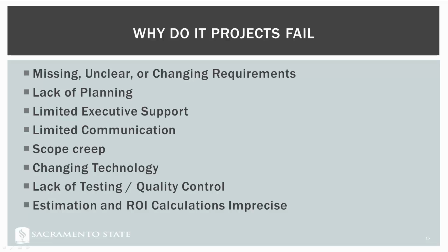Why don't we just add a few things to that system and then we can use it in marketing?" And then someone else plays golf with that marketing manager, and all of a sudden another group within the organization says, "Oh, well, we could use that too, but it would need these 10 additional features." And over time, this project just gets bigger and bigger and more complex, and more features are needed.